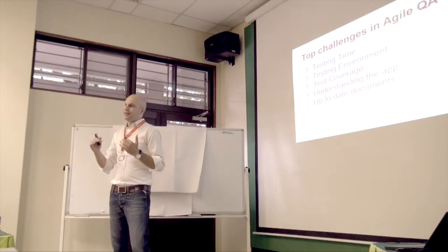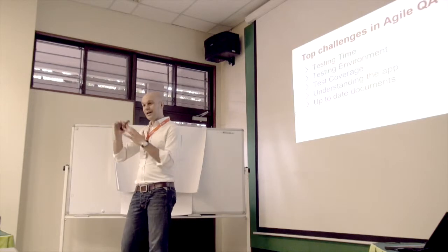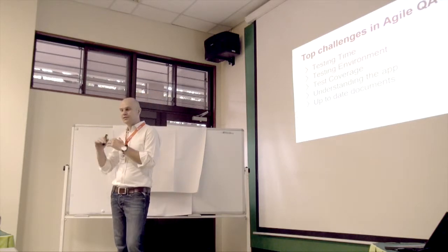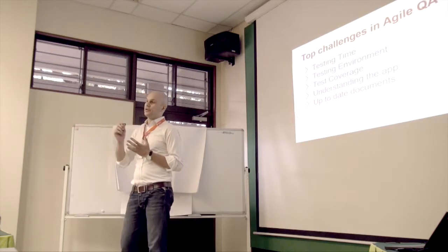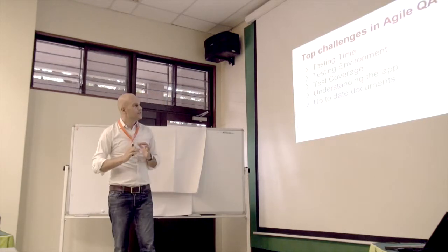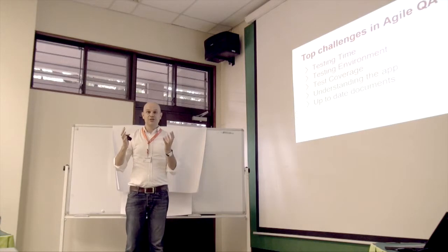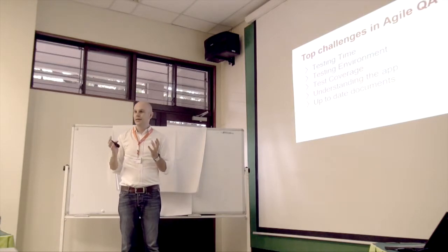So what we do is we write a test plan, we ask the PMs to approve it, which sets what environment should be working, and then we send it to the customer, and he has to approve it as well. So everybody understands the limitation of the testing.